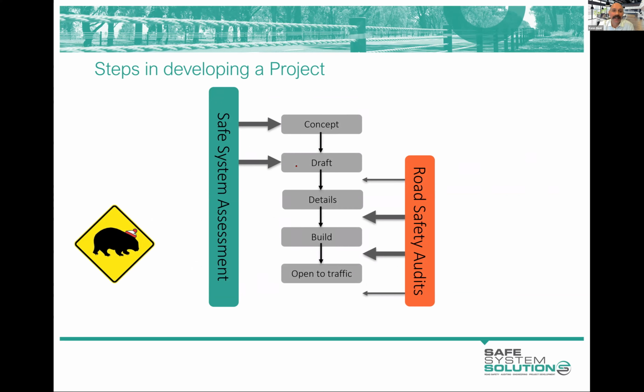Early in the project, in that concept, ideas, options and early planning phase. Because once you're down into the details, the project's kind of set. The big decisions have been made, the intersection form, and they're into details. They're deciding about flare rates of barriers, and little bits and pieces in those details. And that's where a road safety audit tends to be a better independent safety inspection tool.